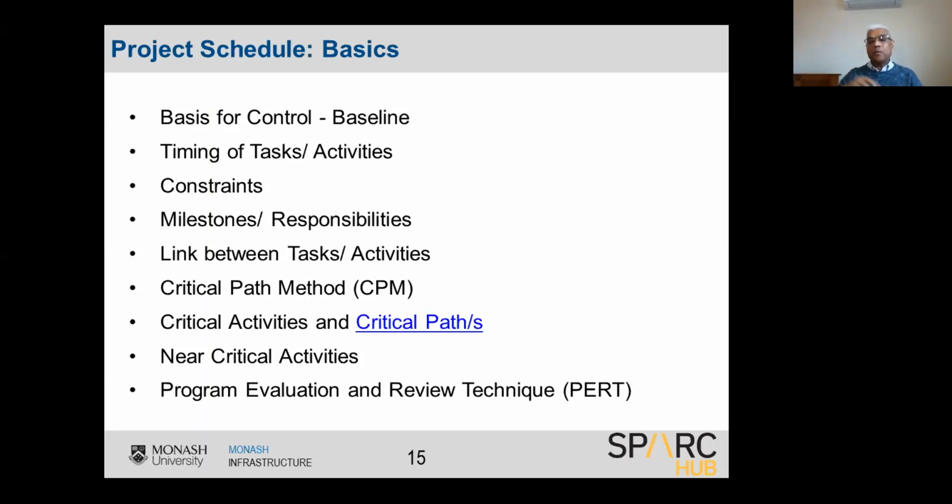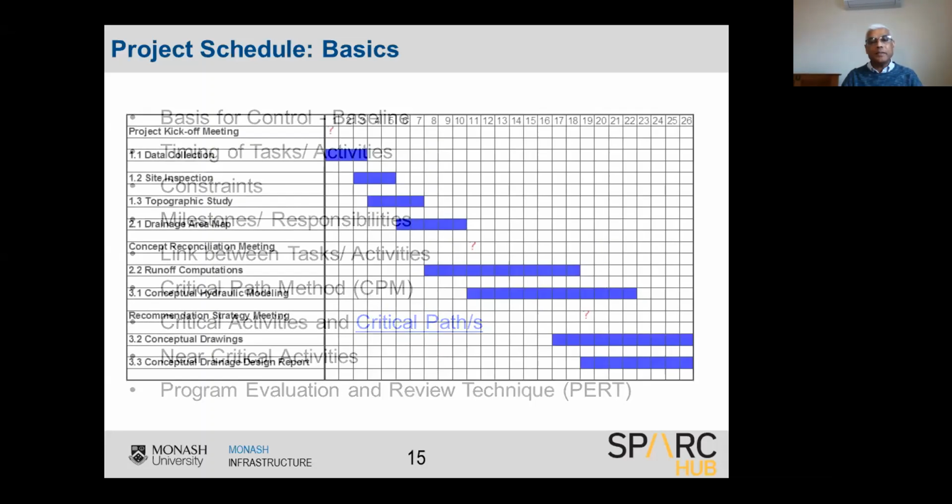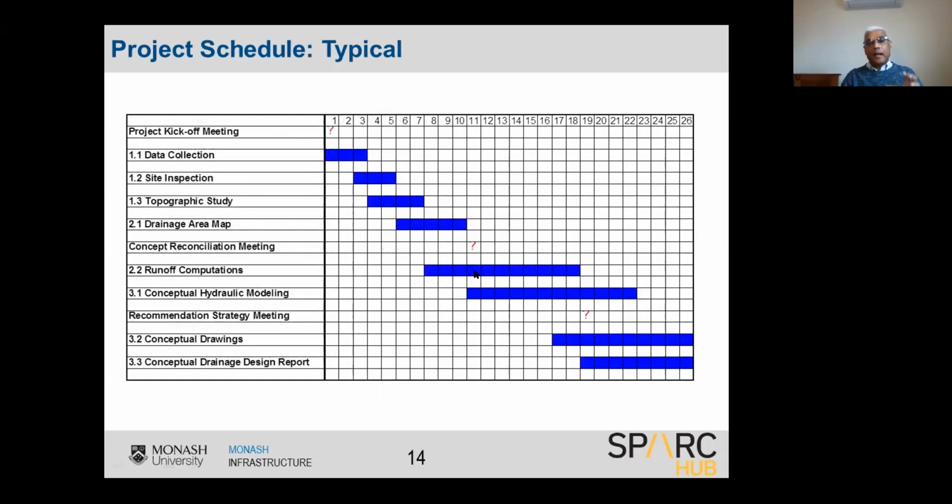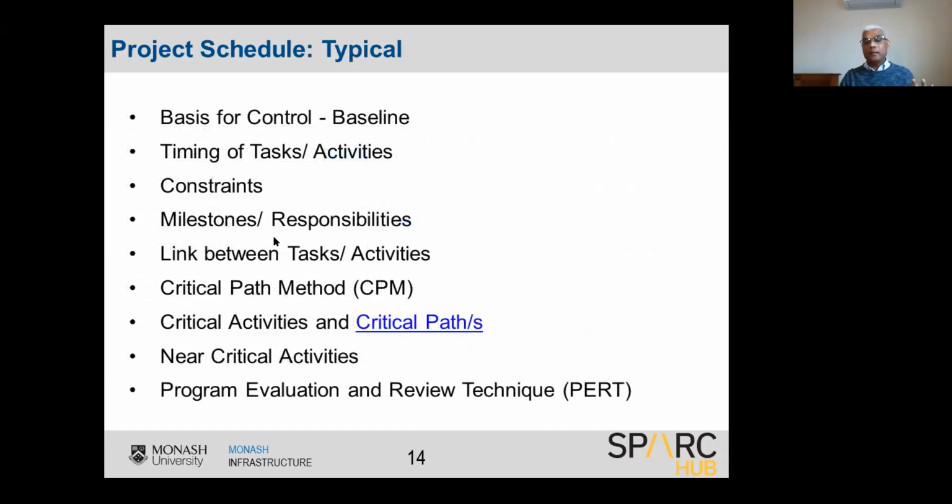And when you put them into a schedule like this, one path may be longer than the other paths. Say, for example, you may finish all your foundation work at the site, but your factory work may still be going on because that's the longer path. Or maybe the overseas work may be the longer path, so that the critical path would then be the overseas set of activities.